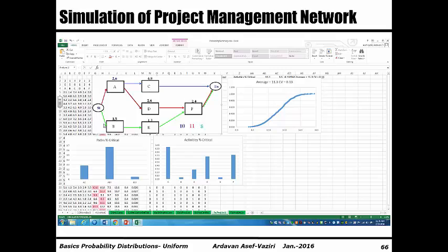It is easy. We find the divergence points. The first divergence point has two lanes associated with it. So there will be two paths. Any other divergence point adds the number of links going out of it minus one to the previous paths. For example, here I have one divergence point with two links, so it will add two minus one paths to it. No other divergence point. Therefore, the number of paths here is three.